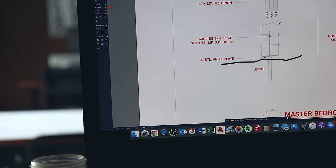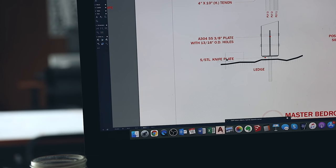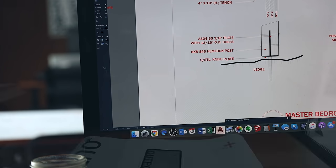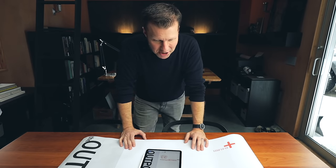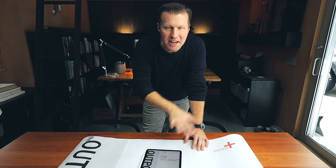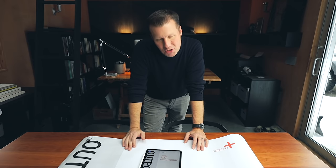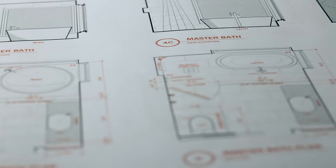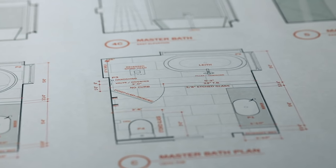A typical drawing set for me may be 35 to 40 sheets of drawings. The difference between a set that's four sheets and one that's 40 sheets is the level of control you're able to exert over the process — the more you draw, the more control you have. Obviously there's a balance to strike: drawing every last corner in detail could get quite expensive, so you need to decide what's important and draw what's appropriate to the particular project.